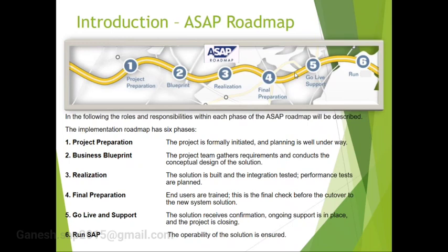At that point of time it is completely tentative, and at a high level they will take some buffer days and prepare the project plan when they initially go for it. But the actual idea will come once we have done the business blueprint. When you do the business blueprint discussions with the business, only then will we come to know what gaps we have and what processes we need to have. Because in the initial sales team and high level management discussions, they may not come to know certain requirements, certain complexities in the warehouse processes, which need to be mapped by doing some custom developments.